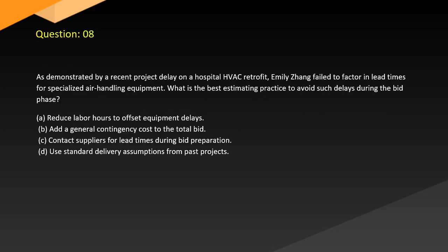Question 8. As demonstrated by a recent project delay on a hospital HVAC retrofit, Emily Zhang failed to factor in lead times for specialized air handling equipment. What is the best estimating practice to avoid such delays during the bid phase? A. Reduce labor hours to offset equipment delays. B. Add a general contingency cost to the total bid. C. Contact suppliers for lead times during bid preparation. D. Use standard delivery assumptions from past projects.